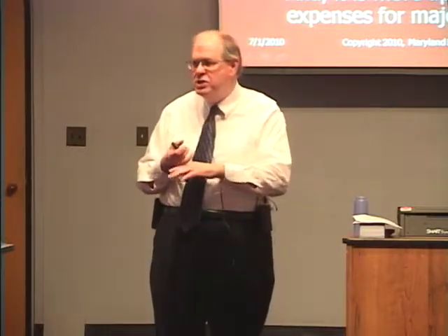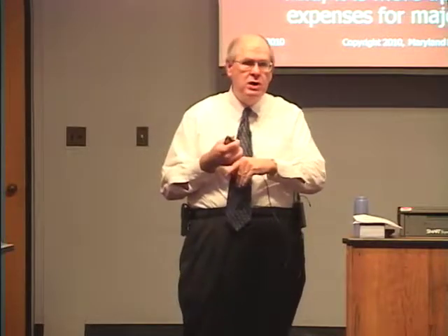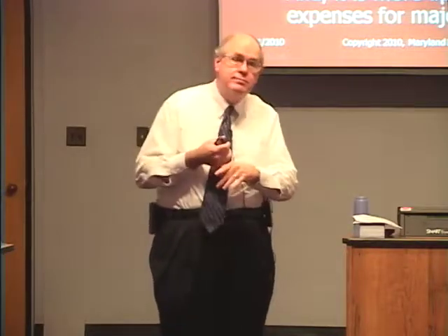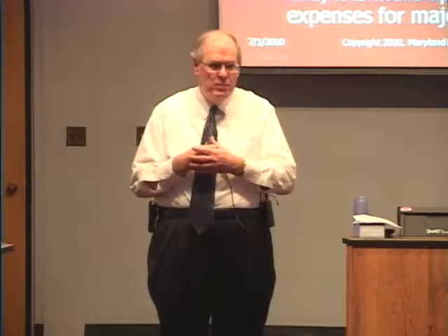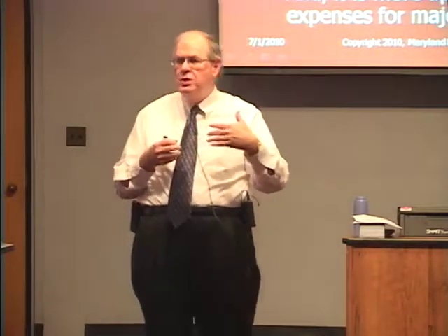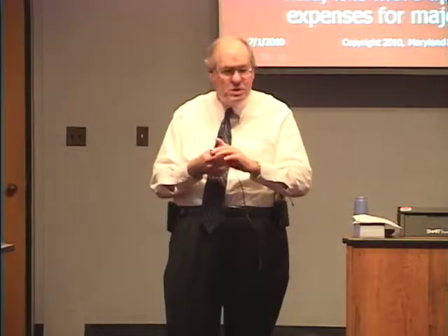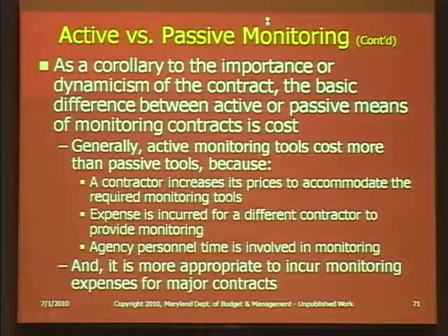If it's something that is going to the general public, well, if someone's riding the subway system and you want to find out whether the public is satisfied with the subway system, then typically you're going to do things like surveys or monitor complaints. These are passive type of monitoring. You can't have the public give you weekly reports because the public is thousands of people. So you have to rely upon other means if the end result is for a large number of users versus a single user, etc. So I'm going to get on that in another slide.